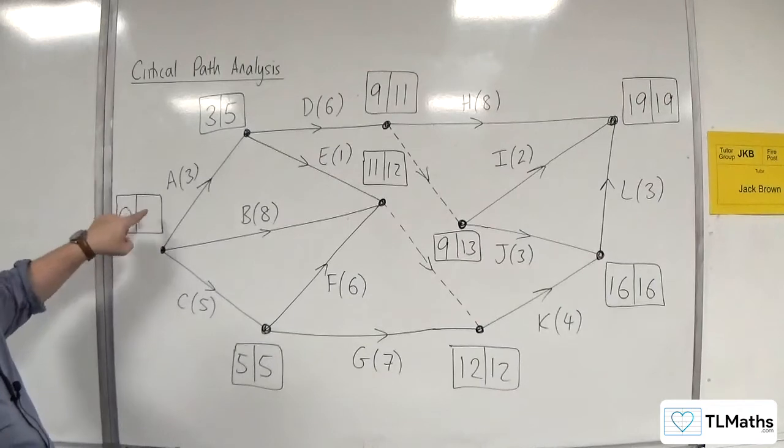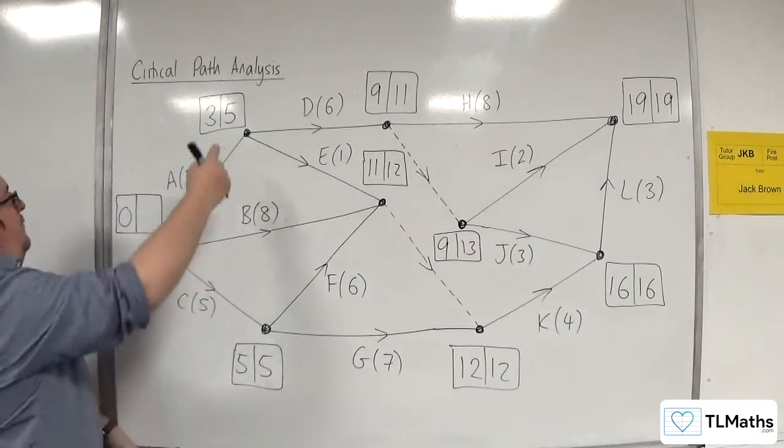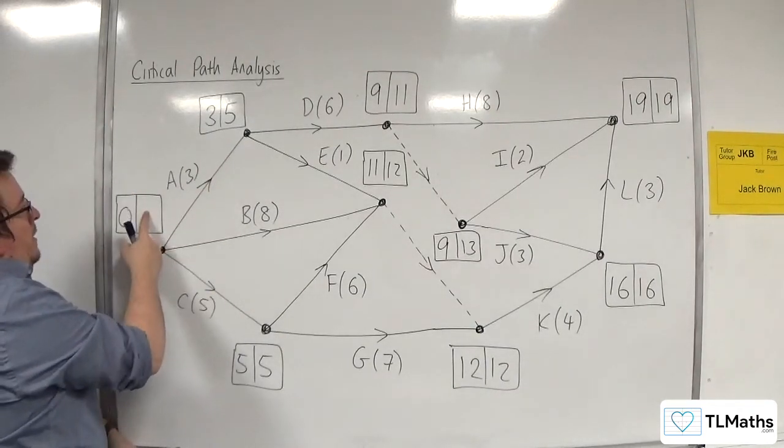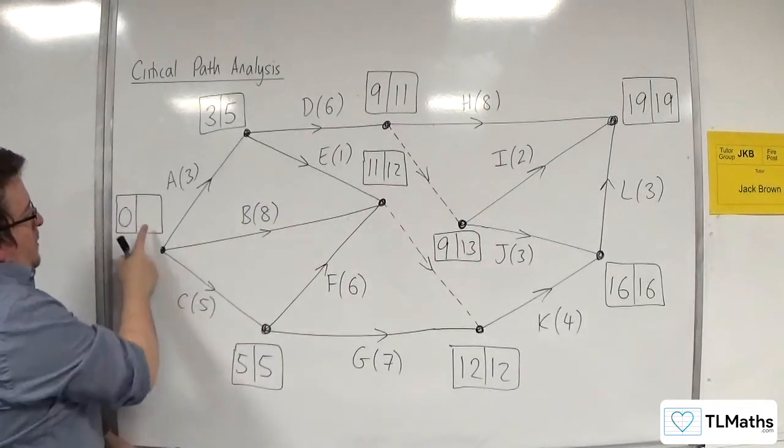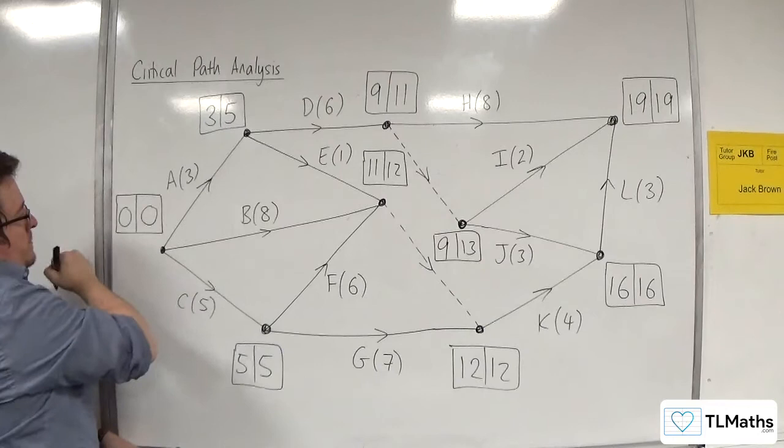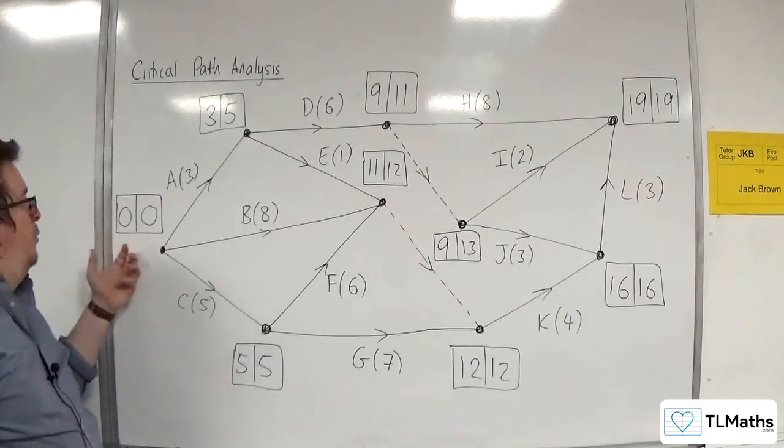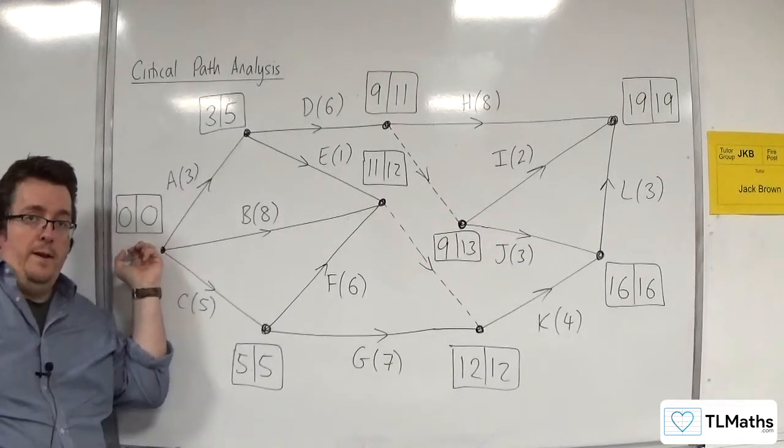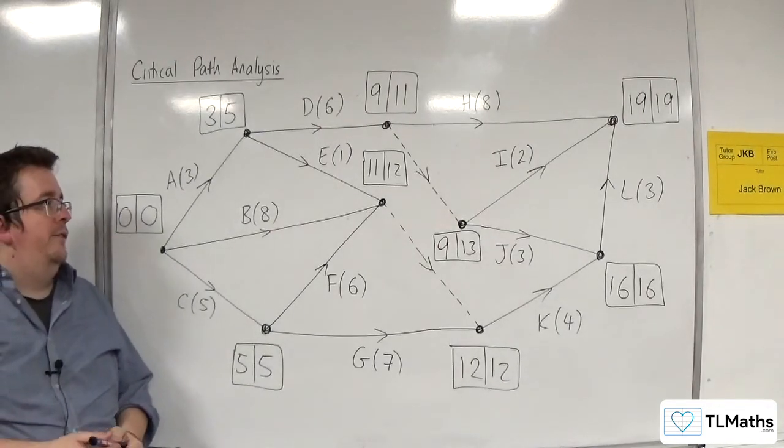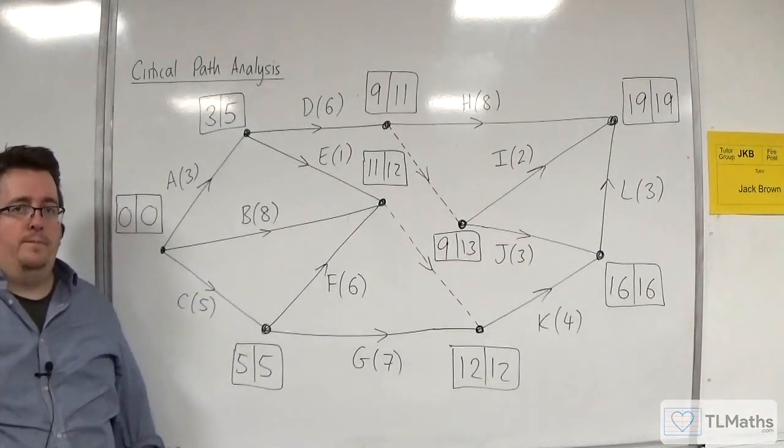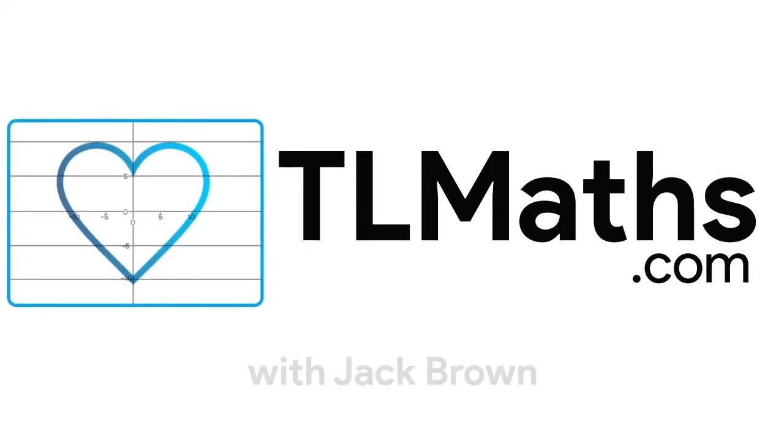Right, then we've finally got this box here. So 5 take away 3 is 2. 12 take away 8 is 4. Or 5 take away 5 is 0. And you might remember that this was always going to be 0 anyway. So that's how we can do the forward and backward pass for this activity network. Good luck.